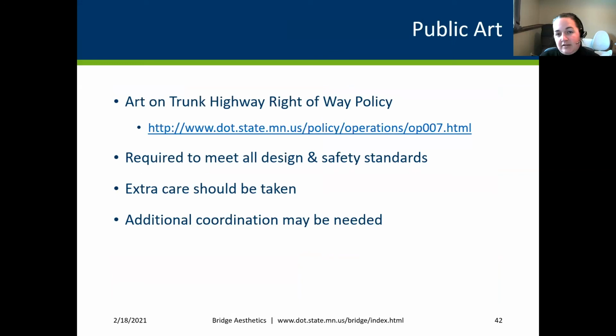Basically, MnDOT cannot pay for public art. It is against state statute. The Constitution of the state of Minnesota says that transportation funds must serve a transportation purpose. Public art does not. A lot of people get confused about what's public art and what's aesthetics. Aesthetics are really an upgrade of some type of feature we already have to have. And like I said, we already know there is a monetary value to that, and it can affect economics in those specific areas. So there is a transportation purpose, or a purpose as a whole.